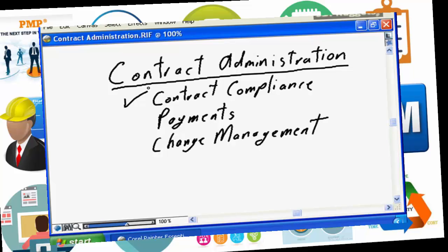But without warning, we got notice from the buyer that they wished to terminate the contract with cause. And with cause means that we have violated the terms and conditions of the contract, and they were able to walk away from the contract with no penalties and no fees. How could they get away with terminating the contract with cause, where in fact we were adhering to the statement of work and everything, the scope, the deliverables, everything was according to specification? They found another clause in the contract that we were in violation of.